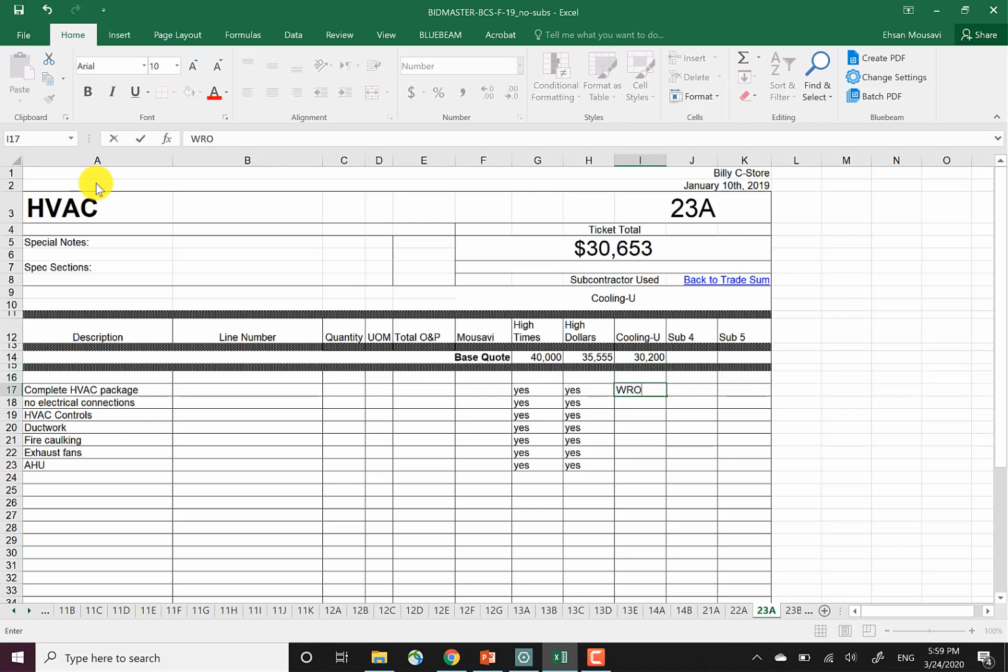However, they have not applied for my job, so I'm actually going to put a fictitiously big number here so my system does not select their number as opposed to another number, right? Because initially, if I remove this, the system will automatically select Cooling U to be the winner. I don't want them to be a part of this, so I have to put a large number here. This way the system finds out that they're not a contender, so they have to actually go off of these two contractors. This is what I want you to do for your semester project as well.